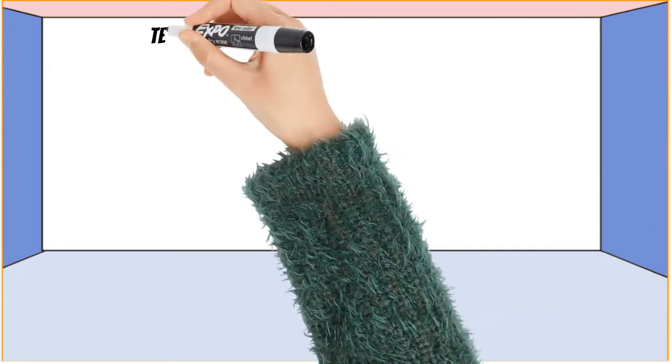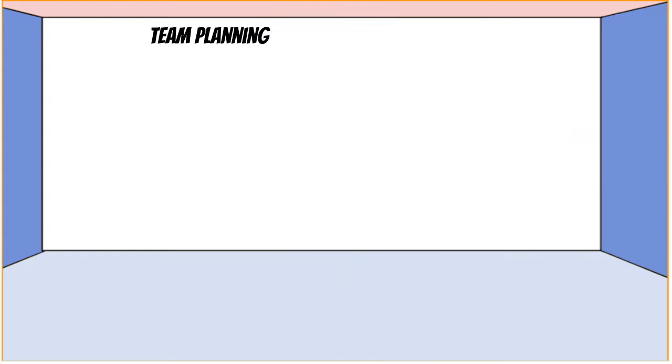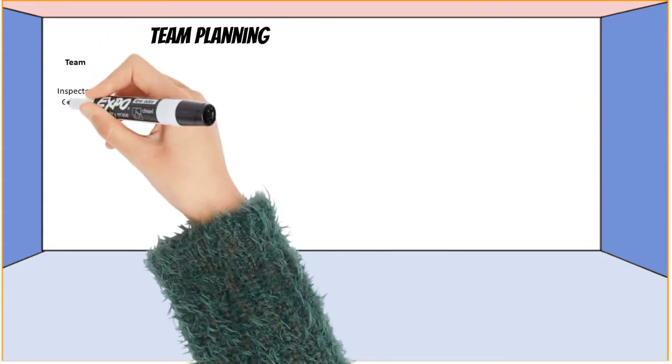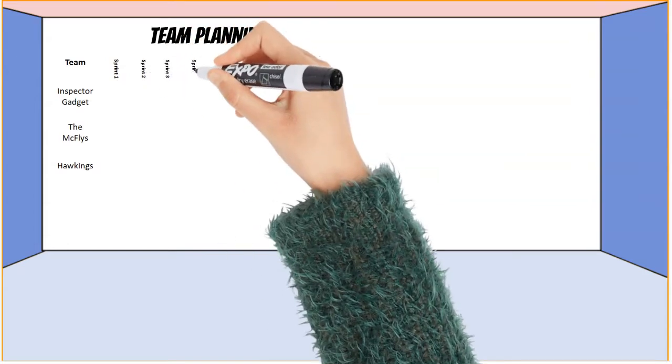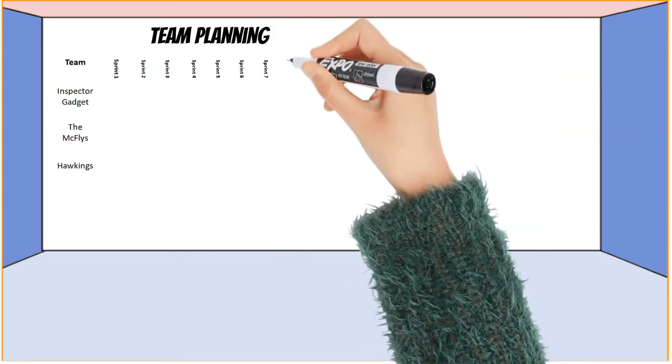Now comes the time to determine which team is best placed to pick up each of the product backlog items. An iteration planning wall is very useful to start laying out the approximate timing of each item, the dependencies, the team capacity and the team availability. The visualisation also helps to spot conflicts in the schedule, overloading or gaps where smaller items can be slotted in.